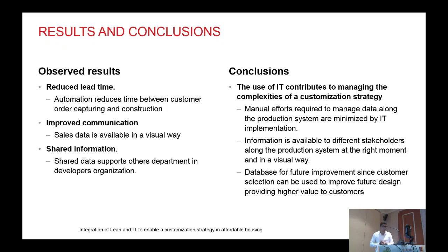So as a result of this experience, we were able to reduce the lead time. That means that by automating all these manual steps that were done in the planning and capturing information from the customer at the sales point, we were able to put this information immediately in front of the construction team, so we receive a customer order and can start construction without any planning time in between. We improved communication because the information is available to everyone in the organization in a visual way. The information is no longer on someone else's hard drive or in someone else's email account. It is available to anyone who can access the system.